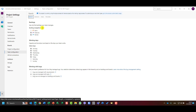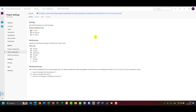In the General tab, I can see the backlog navigation levels my team manages — by default Features and Stories. I'll add Epics as well so the team can manage everything: Epics, Features, and Stories. Working days are set to Monday through Friday by default, which Azure DevOps uses to calculate capacity, remaining work, and burndown charts.